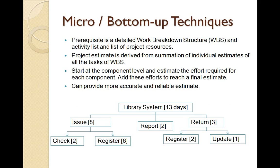You can also use micro or bottom-up techniques. The prerequisite is a work breakdown structure with a detailed task-level breakdown of modules, sub-modules, work packages, and tasks. You estimate at the lowest task level, then sum up to the work package level, and keep summing up to the parent level. This technique is widely used when you can decompose your systems into minute-level tasks and roll up to get top-level estimates.